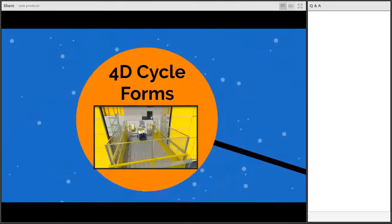Cycling of formwork. Okay, now you have a set of drawings, and how are you going to move that formwork throughout the building? Basically attaching the formwork to the schedule. That's really what's trying to be addressed here. It can be pretty challenging because there are a lot of pieces and parts that go into a lot of formwork systems. So you have the potential for optimizing the amount of formwork on the job, the potential to be confident that you can start returning things because you don't need them anymore, because at this point I'm at my peak total formwork quantity, and what I need to complete is well defined.